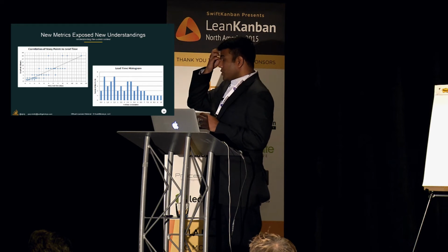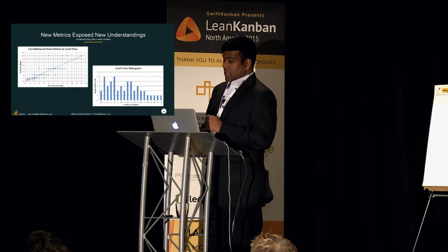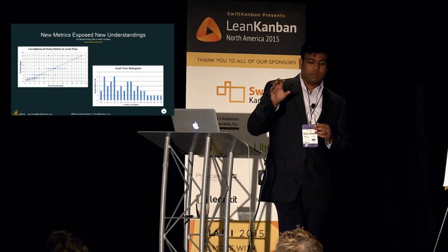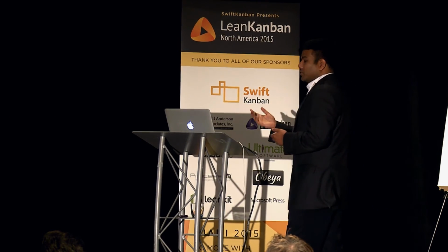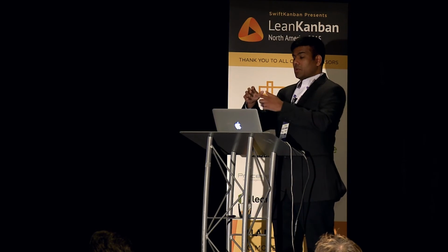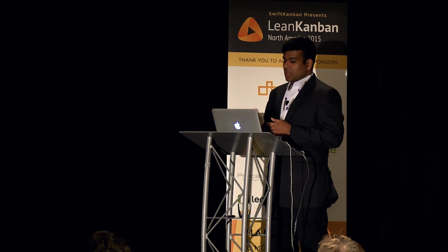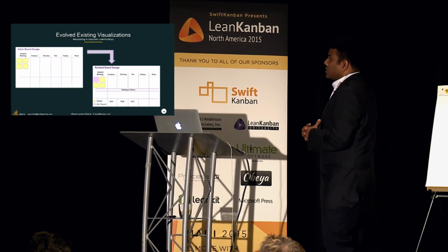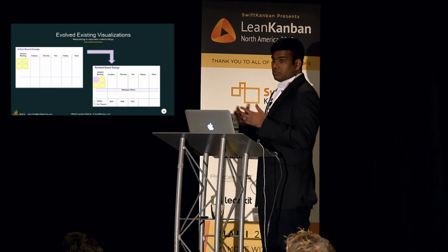What we also started doing was looking at their user stories and how long things actually took. And the clincher was that this was used by the teams to, first of all, truly understand what was happening, and then it became the mechanism, as you'll see, to work with their customers to set expectations. Not just their customers, but also the dependent teams they relied on to get stuff done. From that analysis and the visual workflow, they started visualizing who they were waiting on and getting data on the wait times.